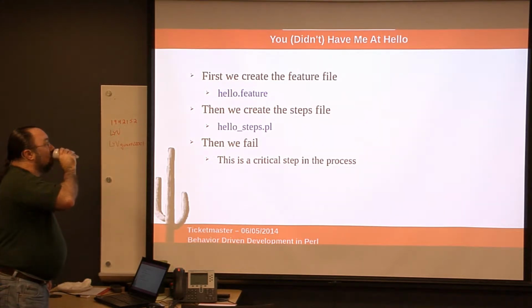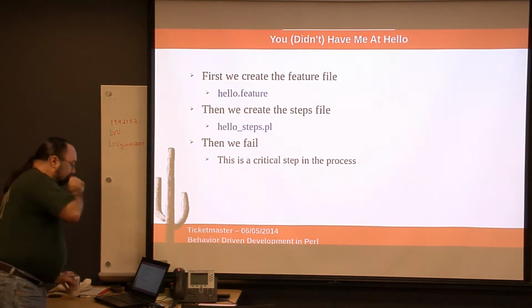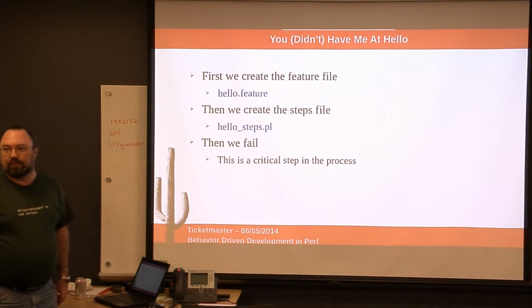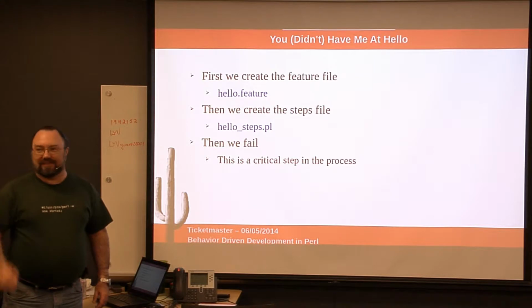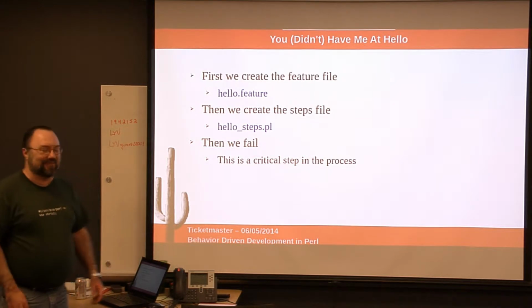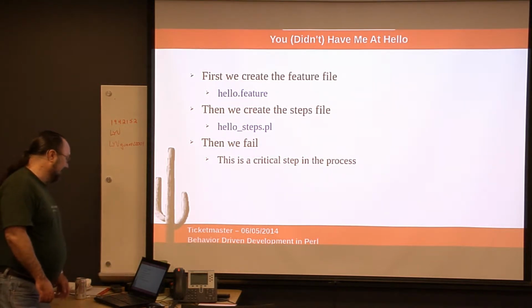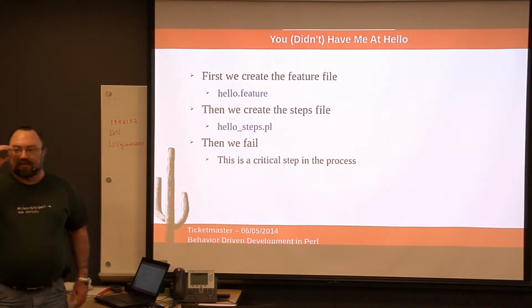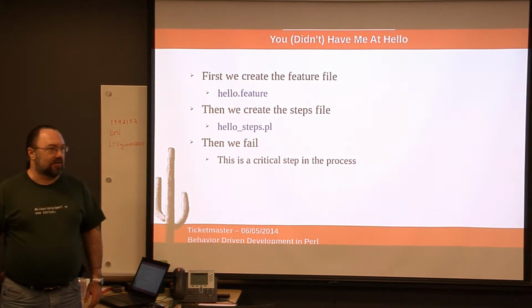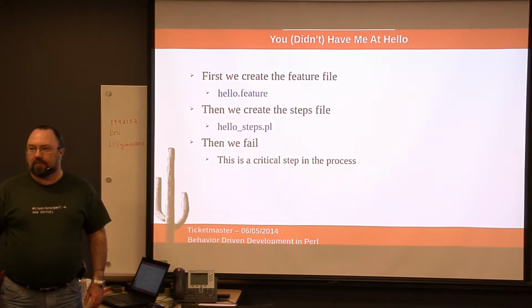Daily stand-ups. We do. Talk about what you did yesterday, what you're going to do today, and whether or not you have any blockers, and if so, what they are. Yep. So it sounds like we're doing the same thing. Does anybody use Kanban? Which is less like iterations and more like a continuous flow.